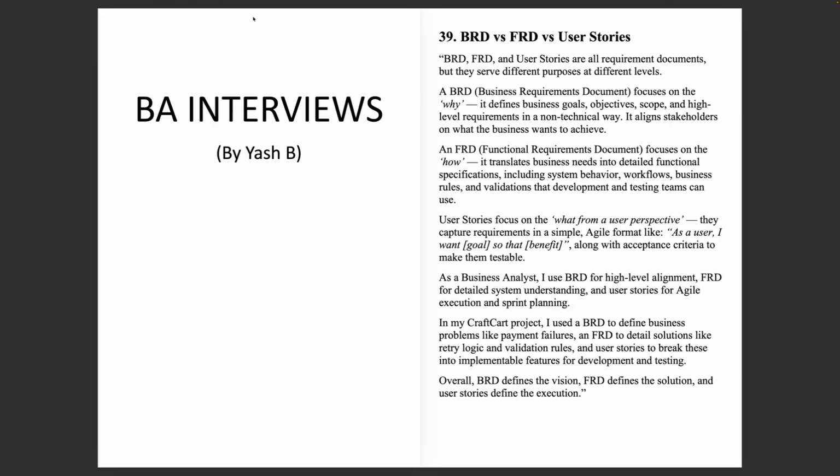And user stories focus on what from a user's perspective. They capture requirements in simple, agile formats like, as a user, I want, so that, along with acceptance criteria to make them testable.